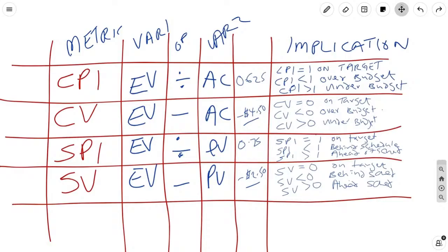So if we have been doing that, then there's something wrong. You see, earned value raises the red flag and says someone's up to something or something's going wrong. Long story short, I do the investigation. I contact our field service engineers. I make the request for an explanation of how we're spending this much. How is this happening? And come to realize we had people who were charging to a wrong cost center.